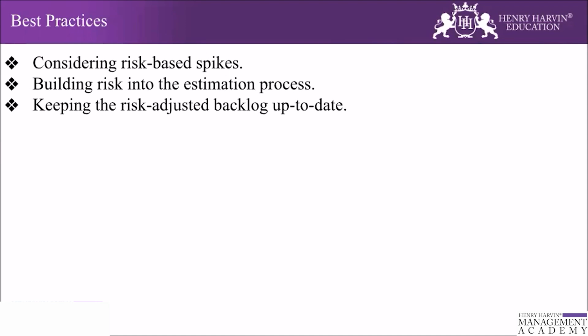Risk-based spikes are useful because they can often lead to fast failure. When you use a spike, you have a greater opportunity to finish it as soon as possible and then conclude whether it is going to help us in the project, or delay us in the project, or any other repercussion that happened because of that spike. In other words, a team can use a risk-based spike to discover that the approach they planned will not work, and they need a new approach.